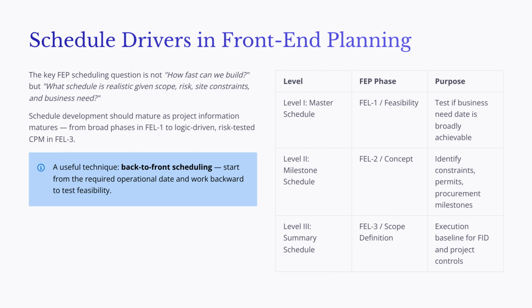Different projects are driven by different schedule pressures. A data center may be driven by a customer contract date, a school project may be driven by the academic calendar, a hospital project may be driven by service continuity, an industrial project may be driven by a plant shutdown or regulatory deadline.